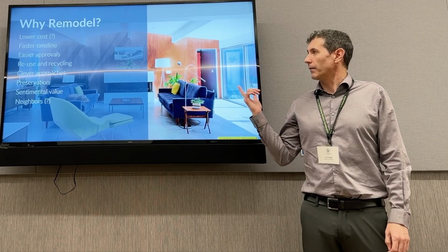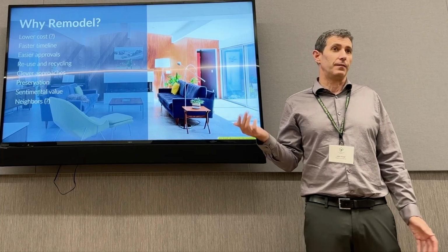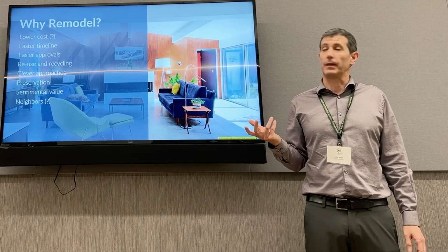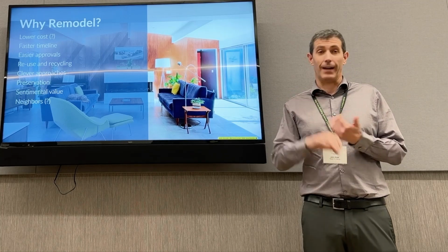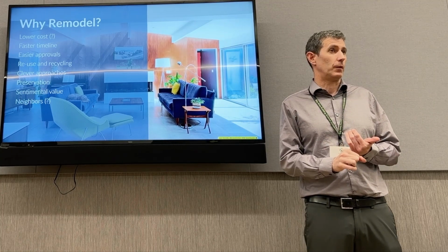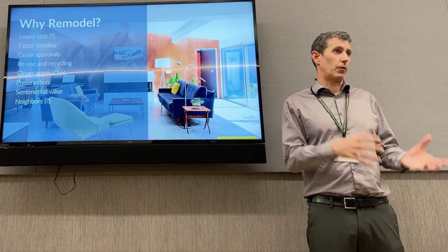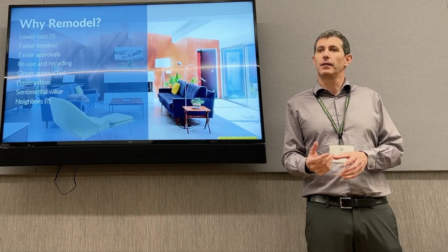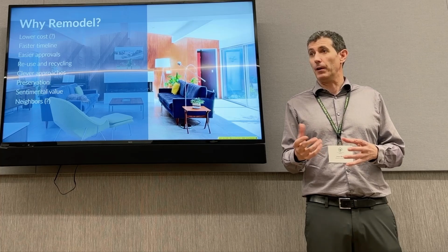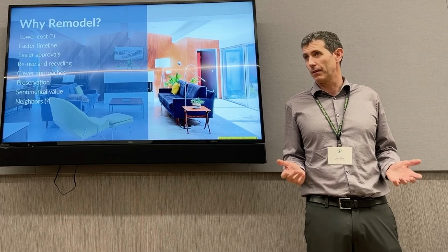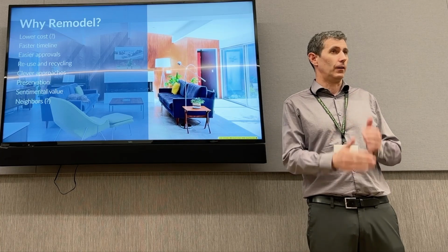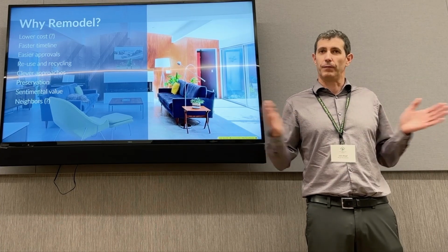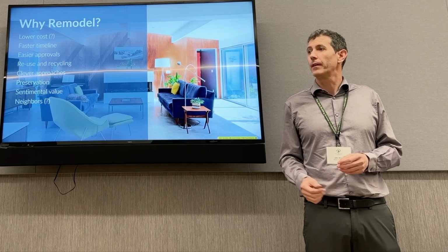The timeline for remodels is typically faster, and timeline's a complicated one. It includes the design time. So if someone comes to me with a remodel, the smaller the remodel, the quicker the design process. The bigger the remodel, a little bit slower, but still much faster than a whole new house. Why? There's a lot more parameters. So your design is going to follow, by nature, it's going to have fewer decisions, take less time.